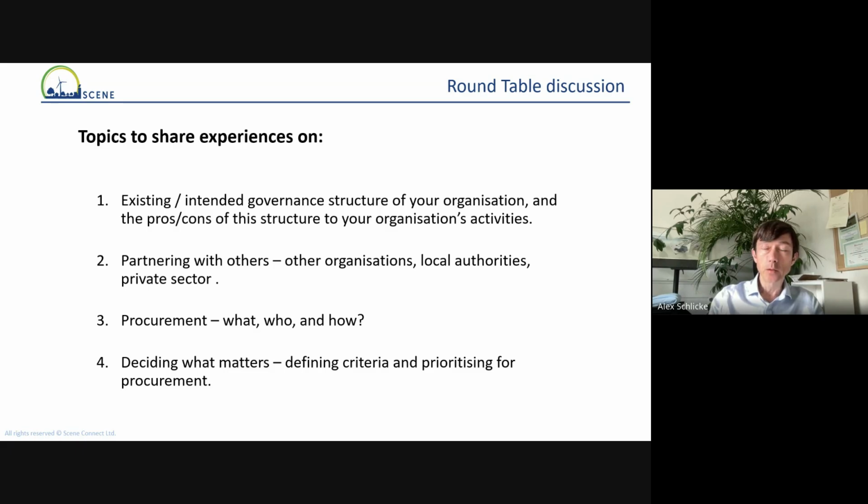And the other thing that's quite important is if you're, say, a group for an area, and you're planning to develop four or five big projects, you might actually be well advised to set up a special purpose vehicle, so a separate governance entity for each of those major projects, so that in the event that one project runs into difficulties and has to be dissolved, it doesn't bring down the entire organization with it. So you kind of ring fence structures and so on.